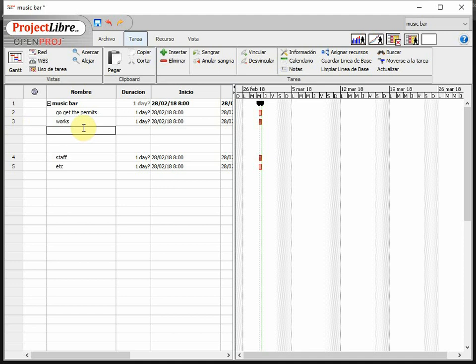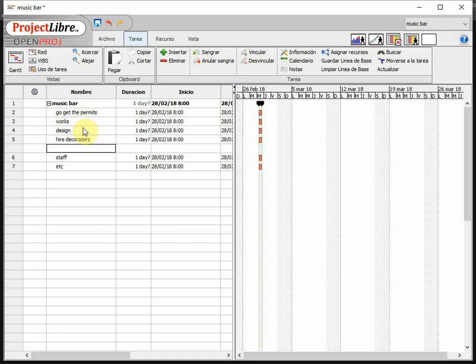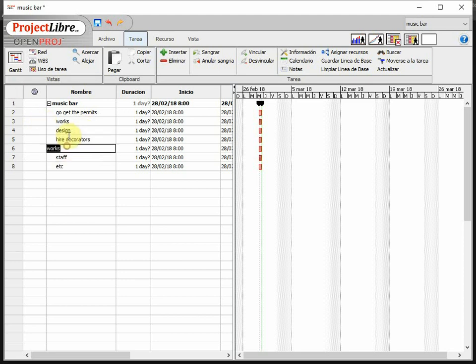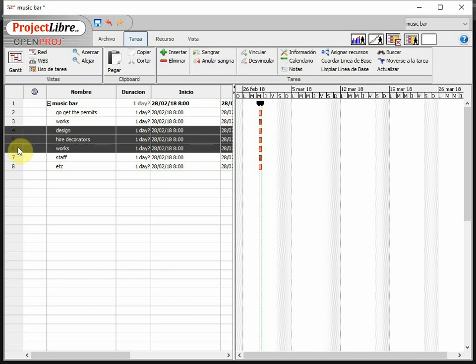So works actually are going to be related to design the new space. Right? Somehow. Then hire the decorators. And then finally do the works themselves. Like do the works. We can now have the three of them inside of works. We select the three of them. And then we do the sangria. Here again inside.